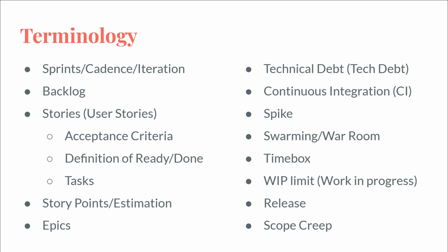And so as a team, your team will sit down, you will discuss a specific story, a specific ticket, and you'll say, here's the work that needs to get done. This is everything we need to know. Is there anything that we need to add into this ticket? Anything that's missing? Does anyone have questions? Does everyone understand it? And then as a team, once everyone understands it and the ticket's good, then you'd say, okay, how big is this?